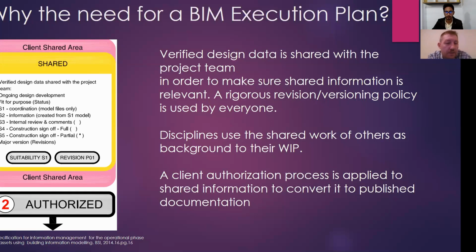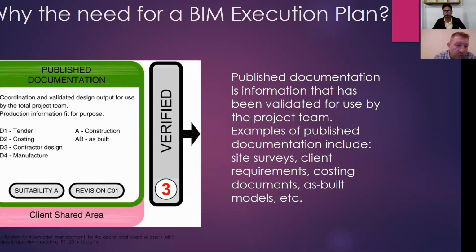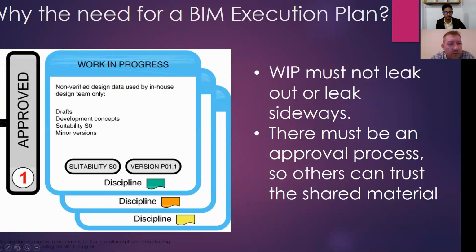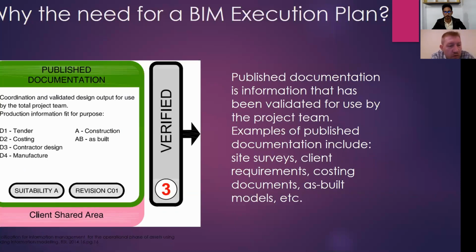So after you finish the sharing, you can follow the arrows in here. So approved. So after the work in progress is approved, this will be on the firm level. Okay. Then you go into the environment where all the stakeholders are involved, and then authorized documents go to what we call published documents, okay, which are costing, your contract design, manufacture, construction, and as-built.